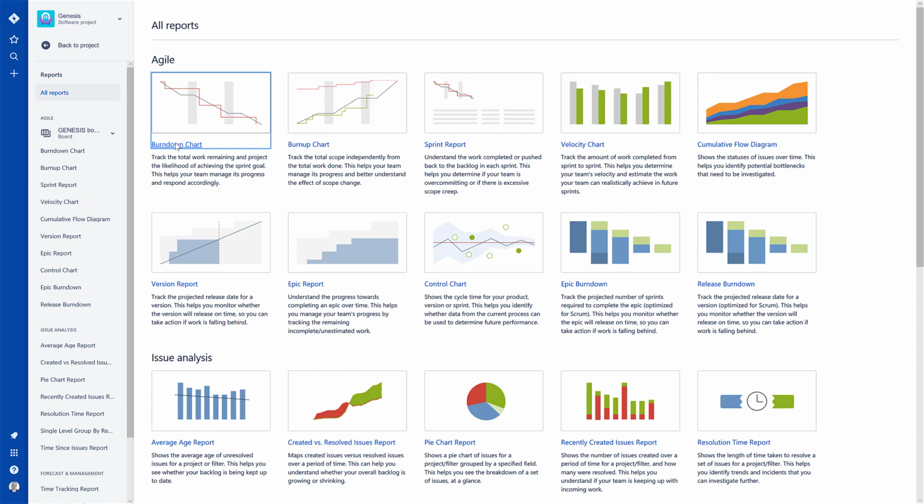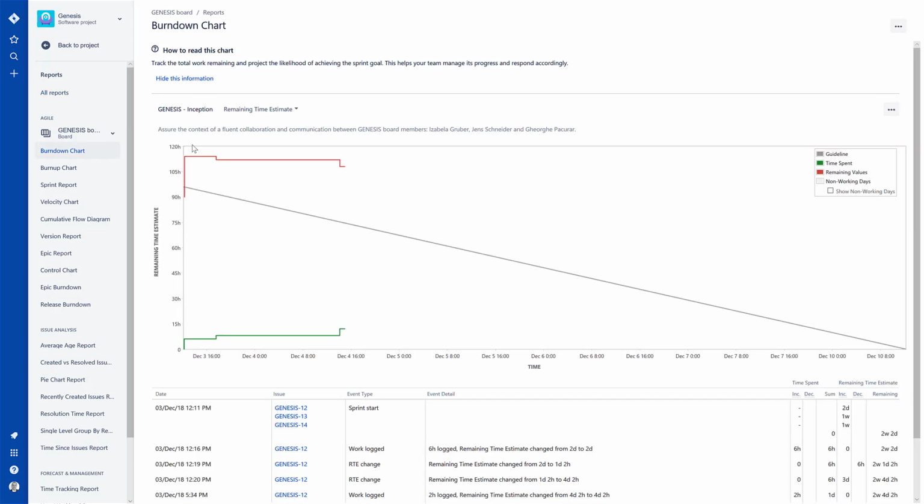The burndown chart is showing all the time how much time remains until the end of the project, and additionally in JIRA we can also see the work done. So having the green line, we see the amount of hours done, and following the red line we see what work was already solved. Why are these two curves so important, and why are there two?